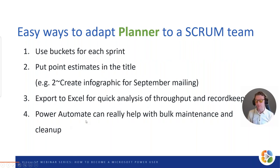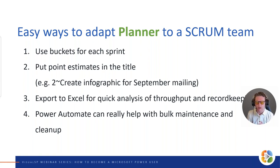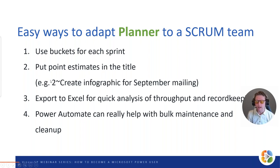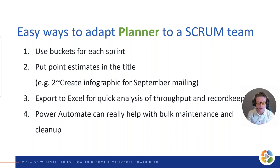For scrum teams specifically: use buckets for each sprint to make sprint planning easy and to roll tasks forward if needed. For estimating, I suggest putting story points in the task title using a number followed by a tilde character — for example '5~'. The reason is that when you export to Excel (tip number three), Excel makes it easy to separate those points into their own column with a couple of clicks, and then you can analyze velocity over time.